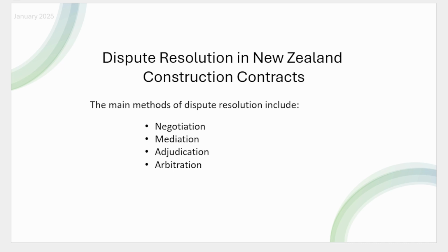Arbitration. Arbitration is a widely used method of alternative dispute resolution in construction projects, where an impartial third party, known as the arbitrator, is appointed to review the evidence, hear the arguments from all involved, and make a binding decision to resolve the dispute. Unlike court proceedings, arbitration is typically faster, more flexible, and confidential, offering a streamlined process to settle conflicts without the need for litigation. It is often preferred for resolving issues related to contract terms, delays, and payment disputes, providing a more cost-effective and efficient way to bring closure to disagreements.